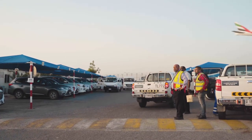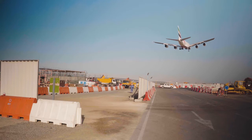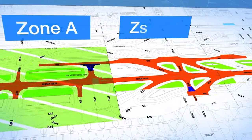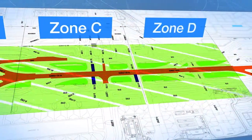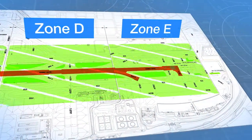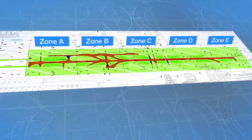As the 16th of April dawned, the team were confident that every contingency had been examined and every possibility considered. I can say 99.9% of the required information, materials, drawings, everything was available before the start of the job. The decision had been taken to divide the work area into 5 distinct zones, A to E. It would allow for the precise application of every activity and closer inspection of the hour-by-hour or daily goals. The move would guarantee the maximum efficiency of people and plant and minimize unnecessary movement.